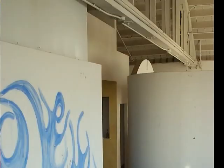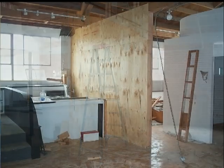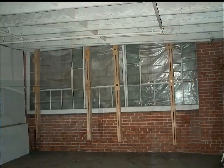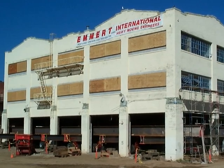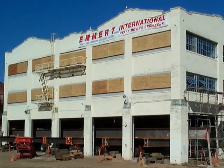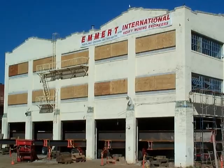Portions of the third floor had been converted to apartments, and some of the walls and partitions had to be demolished as well. Once the areas were cleared, crews built stud walls between the floor and the roof trusses to tie the roof to the floor. Also included in the shoring was the installation of concrete blocks in each window opening, followed by the installation of an interior and exterior frame to ensure that no movement would occur in the window areas as the building was being moved. The steel frames of the windows had to be preserved for reinstallation after the move.